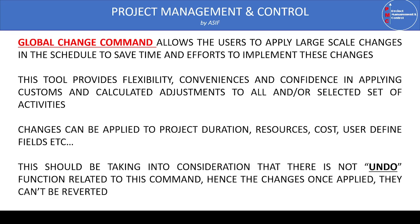With Global Change we can modify project activity durations — either increase or decrease by some proportion or percentage. Similarly, we can modify the resources and costs assigned, increasing or decreasing them by some proportion or percentage. We can also fill data for user-defined fields using Global Change very easily.